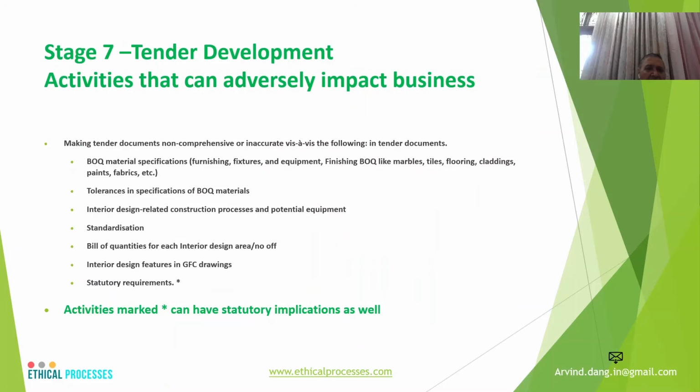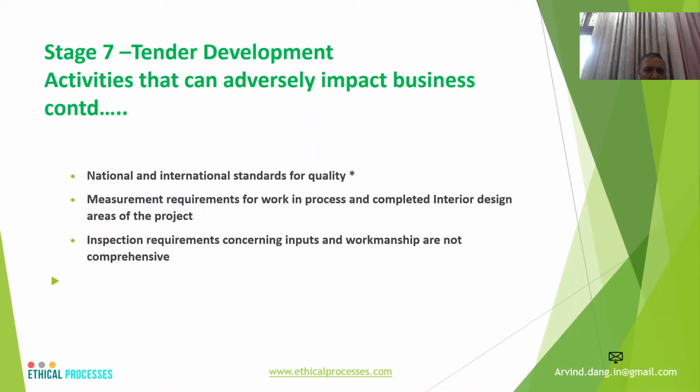And the next stage is the development of the tenders. Here the tender specifications in terms of the FFE or the finishing material, etc., are not comprehensive. In case they are not comprehensive, they can lead to adversely impacting business. Tolerances are not specified properly. Construction design, interior design, and construction related processes are not adequately defined. There is lack of standardization, the bill of materials is inaccurate, or interior design features in the GFC drawings are not adequately incorporated.